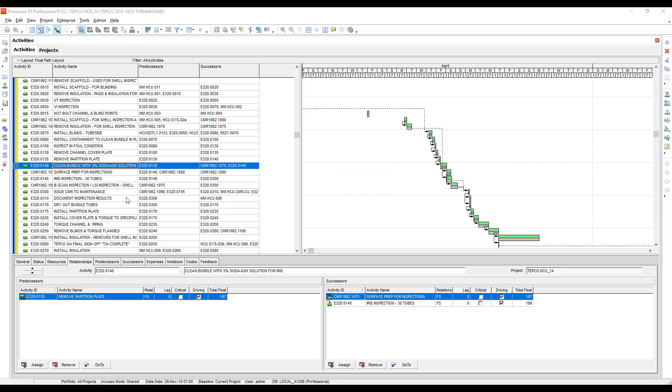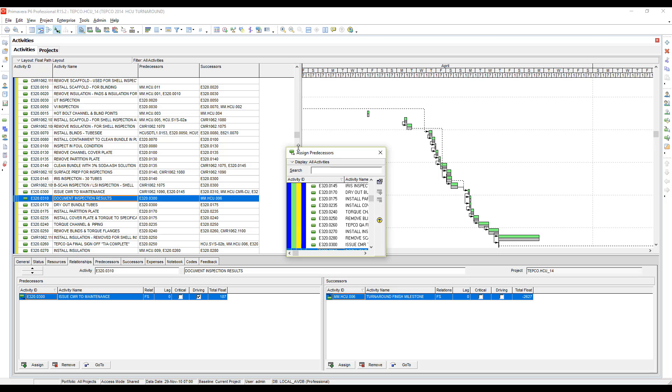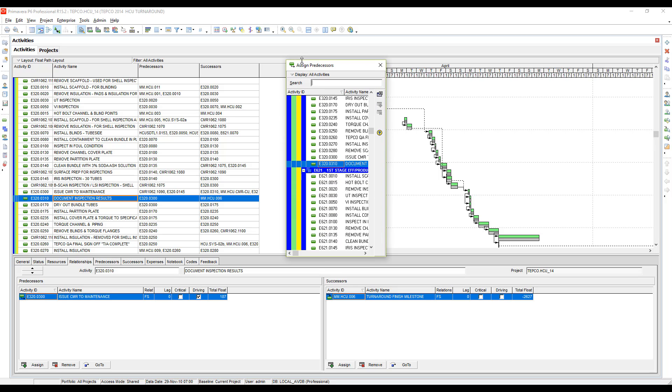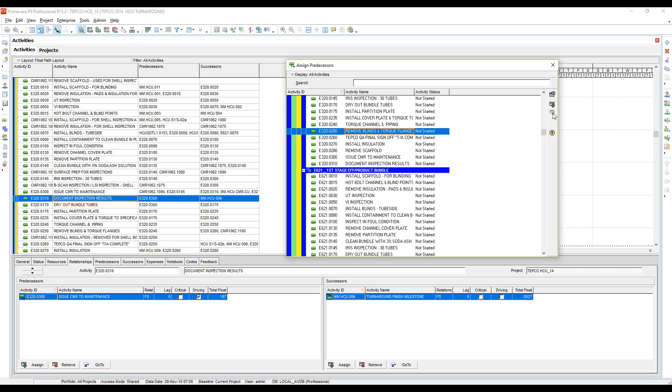Another option is to select an activity and over here on the right-hand side you have predecessors and successors buttons, so I could remove the predecessor from this activity. Problem here is that I would have to actually go find the specific predecessor that's on it, and once I find it, the red X to remove the relationship will become active over here.